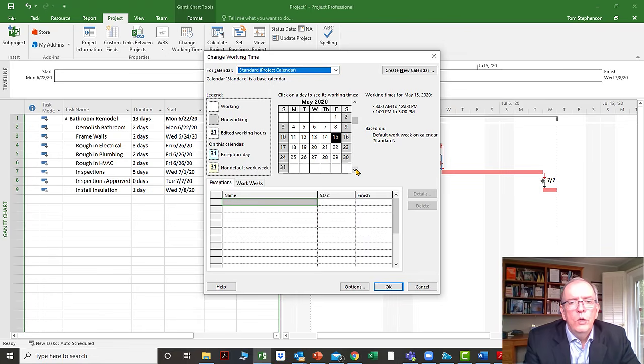It gets a little bit tricky to get used to this, but in the calendar view, you can adjust your calendar. What you really want in scheduling software is to have all of your non-working days put in at the start of a project. I know for construction companies, or if you work in a project-based company, even in IT where you do nothing but projects, a good thing would be to start out with a template file where you put in all of your standard holidays and days off that your company takes.